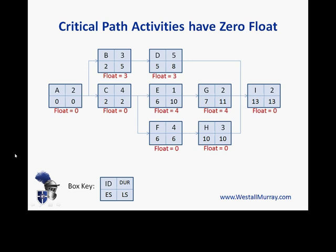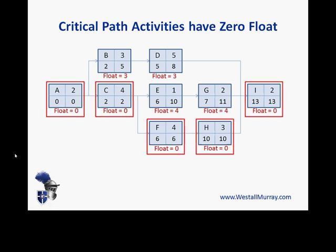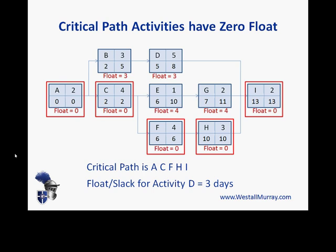The critical path consists of all zero-float activities: A, C, F, H, and I. As for the duration — be careful — it's not 13 days, it's 15 days, because you have to add in the duration of activity I. The best way is to add up the durations; don't be fooled by the 13 in the early start. The float and slack for activity D is 3 days.